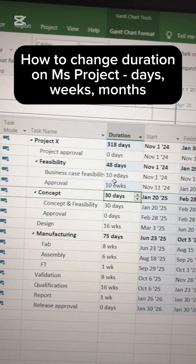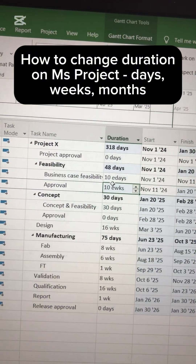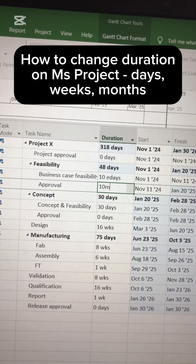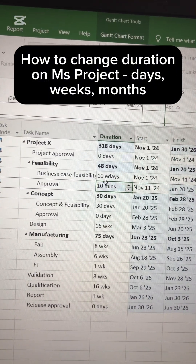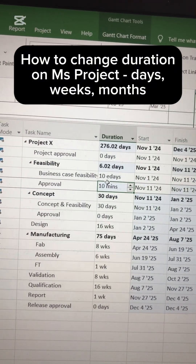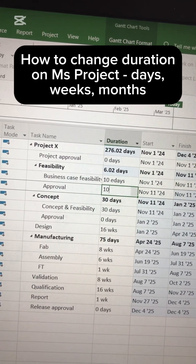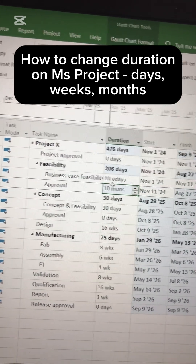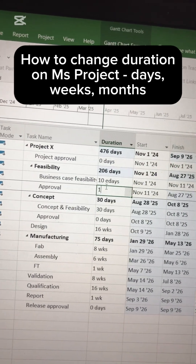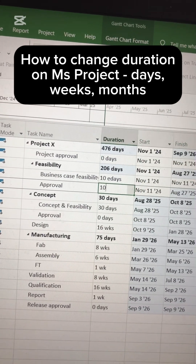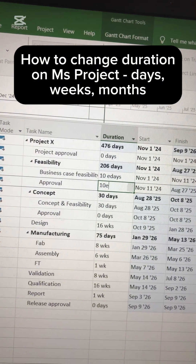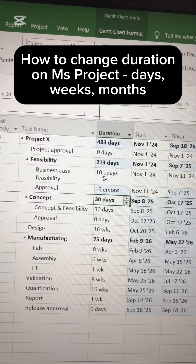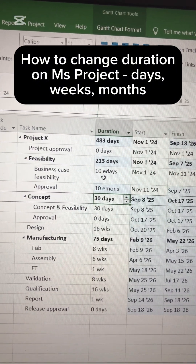You can use the same trick for months. You can put 10 months using '10mo'. Note that just 'm' puts minutes, so make sure to use 'mo' for months, or '10emo' for elapsed running months.